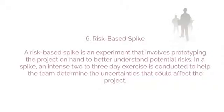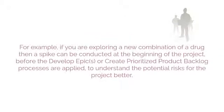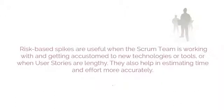A risk-based spike is an experiment that involves prototyping the project to better understand potential risks. In a spike, an intense two- to three-day exercise is conducted to help the team determine the uncertainties that could affect the project. For example, if exploring a new drug combination, a spike can be conducted at the beginning of the project, before the Develop Epics or Create Prioritized Product Backlog processes are applied. Risk-based spikes are useful when the Scrum team is working with new technologies or tools, or when user stories are lengthy. They also help in estimating time and effort more accurately.